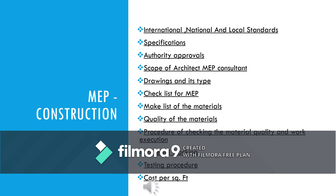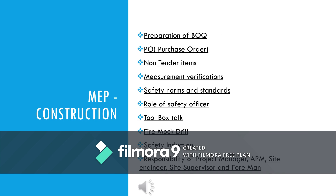For everything there is a testing procedure, and those things we will study in detail. Next, overall cost per square feet — in a certain building, if a certain package is done, what will be the cost per square feet? Similarly, preparation of BOQ — bill of quantities — what are the items coming in a building, what is the quantity, what is the description? We should include all scope properly so that no material or description is missed.